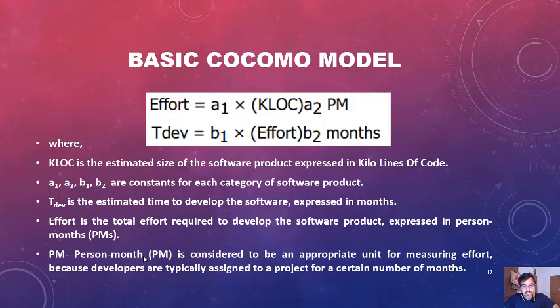This is the idea of person month, but actually person month is not working like that. The main theme of person month is not that if you have 1000 person months, you employ all 1000 persons in a single month and complete the project. It is not actually done. How the scheduling will be done is another matter. This person month is calculated only to calculate the effort, how much effort is required to develop your software.